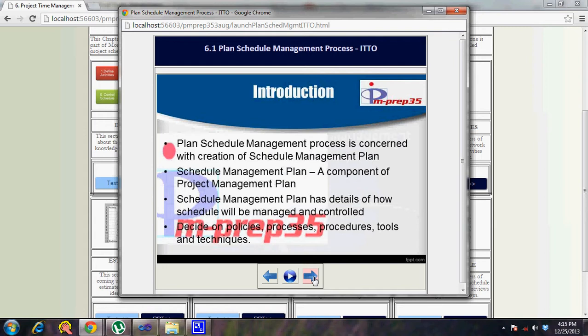The schedule management plan is a baseline document that does not undergo changes unless there is a valid case going through the change request or change control process. It is used during monitoring and controlling to check performance against the baseline. For example, if you want to change the project schedule document, you refer to the plan to find the approving authority, the process, and the factors to keep in mind.